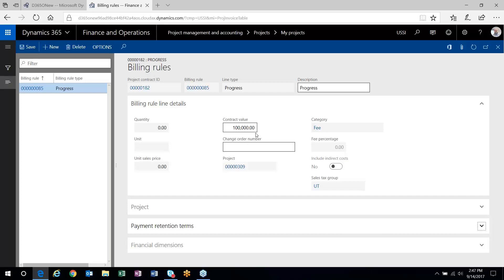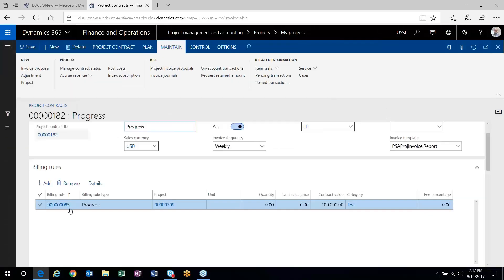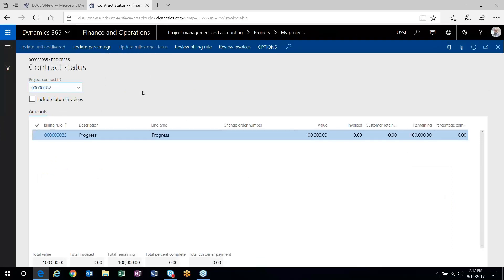I've got my progress billing rule set up. Once that is set up, in order to maintain the billing rule and tell the system what progress has been made, on the project contract in the process area there is a Manage Contract Status button. This form pops up and shows the billing rules set up on your project. Based on the billing rule type you'll have options here, and since this is a progress billing rule type, I can specify the percentage to invoice.